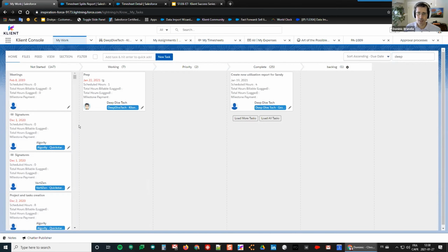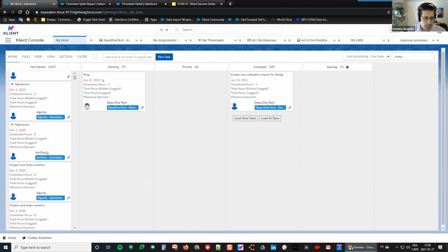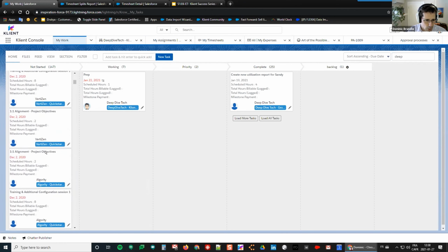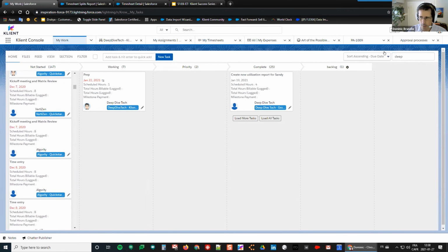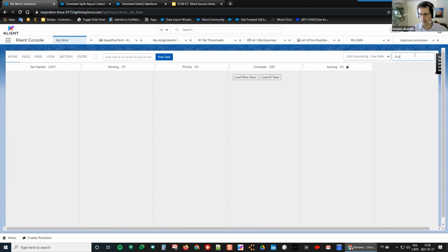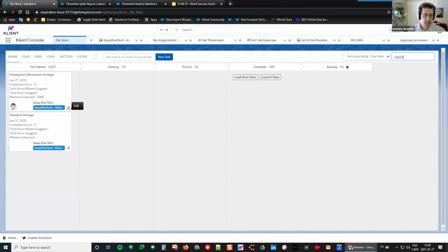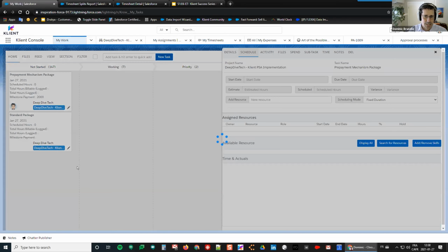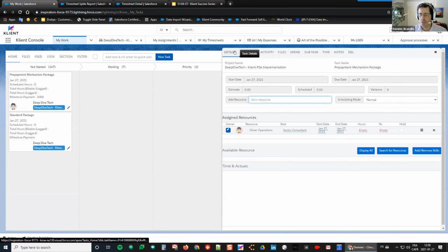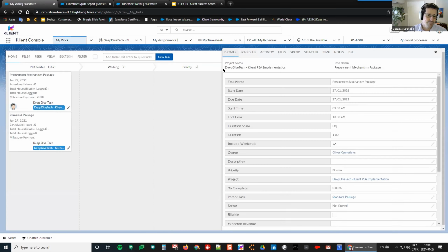So basically, if we have a milestone task that we're working on, I think I called it package just for the example. Yeah, right here. So basically, the milestones could be used in the billing approach, as we could say, whenever we're complete with this task, with the package deployment, standard product installation, whatever is the use case, we want that to be billed at that time.